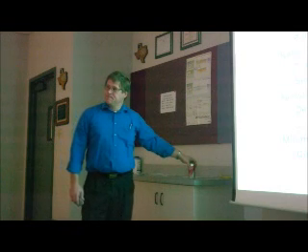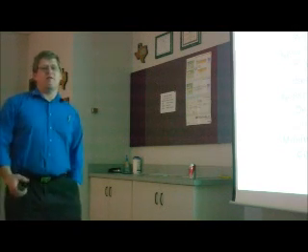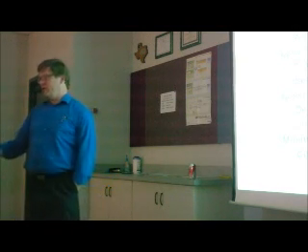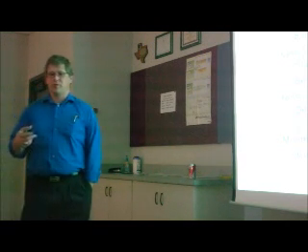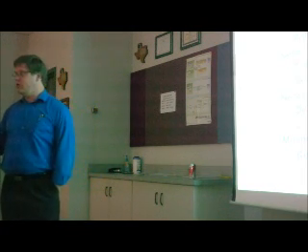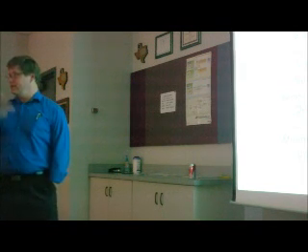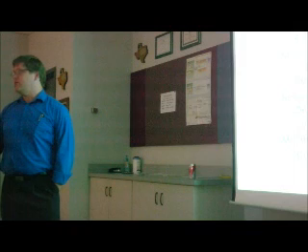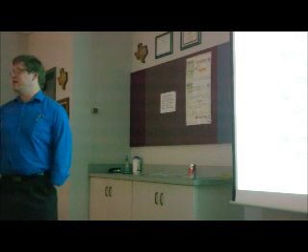So what's the difference between an RFP and a business case? Because an RFP also has lists of things like costs and all that, right? An RFP is a formal document that you're going to give to a vendor. The business case is really kind of more of an abstract term that you're going to be delivering to the powers that be within your organization. So to get them to open their pocketbooks to pay the vendor for their hardware, software, their expertise, or wherever it is you're going to get your goods and services from, you're trying to get them to make that investment.